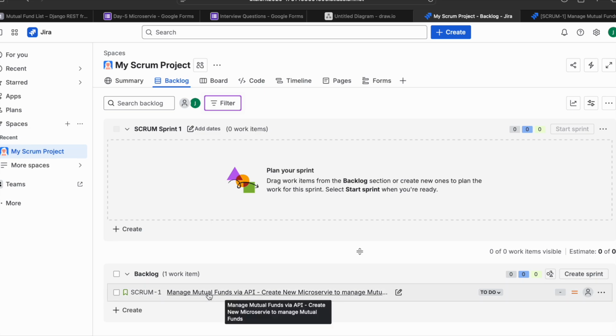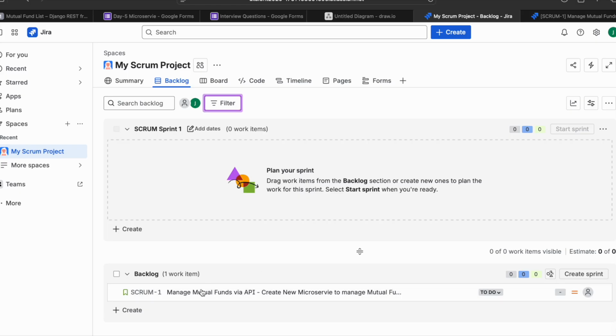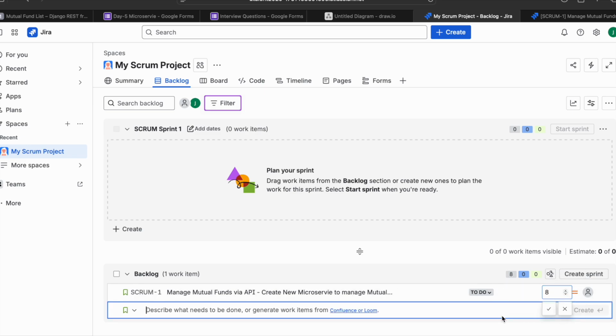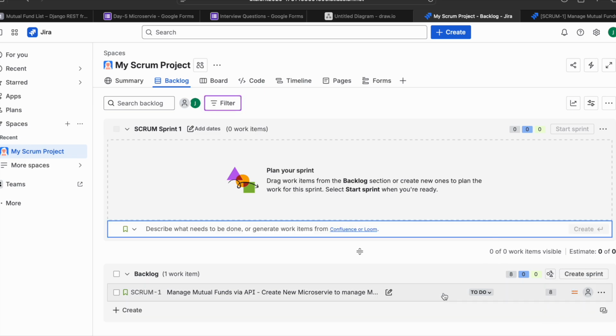the framework setup is ready, and we are taking these user stories, right? Let's assume all our microservice structure is already existing. We are trying to add endpoints to our microservice. So that's all about this user story. For this one, I would say it's not very difficult once we have everything. So I would say 5 story points, but if you are going to do the two services here itself, you can go with 8. We have GET and POST together here, so we'll go with 8.